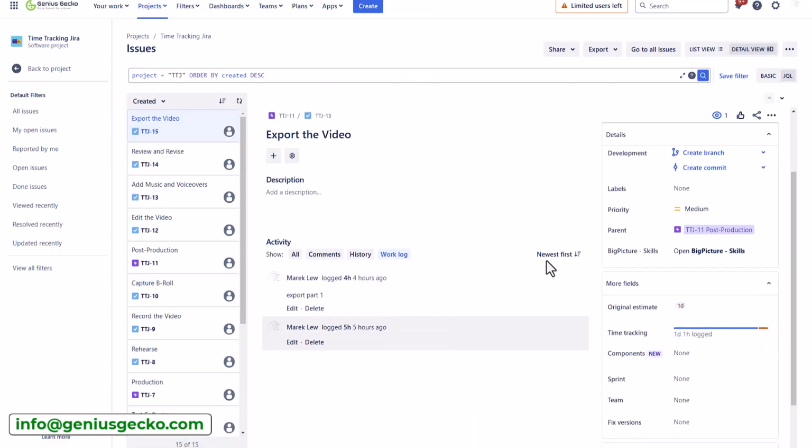And there is a field in Jira called work ratio that will help you to show how accurate your estimations were. It will compare the actual work logged versus the original estimates, which will be very helpful when forecasting the workload for your future projects. So here we have exceeded the initial estimation, hence the work ratio will be above 100%. A nice field to use. I will show you that in the later part of the video.